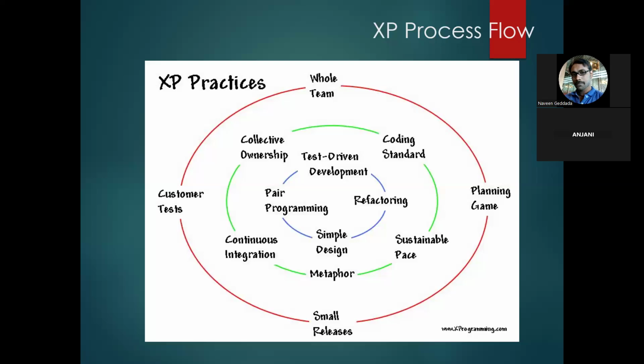As it is in the development phase, the developers will give the sprint poker points, like three story points, or one, or five, or two. Each story point we calculate as 8 working hours. So for uploading the patient details, you have given three story points, which is 3 into 8, 24 hours.